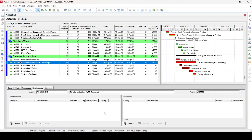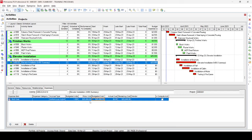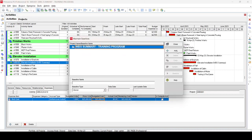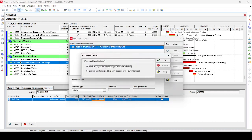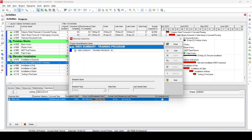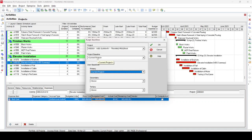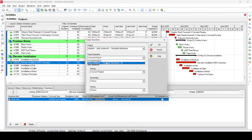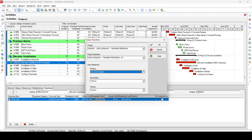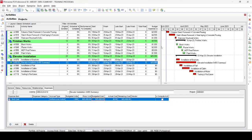So now we already assigned the resources and expense to the activity, we assumed $25,000. Before now, we are ready to update this project. Before updating the project, we are going to project and in the maintain baseline, we add a copy of this project as a baseline. Then after making this baseline, we assign project baseline and primary baseline. It is recommended to assign both project and primary baseline at the same time. If you assign only the project baseline, some values are mentioned as a primary baseline. So if you have a primary baseline, you can see the current project. Some dates are not matching, so it is always recommended that whenever you make the primary baseline and project baseline, they should be the same. Once you have this, now we are updating this project.